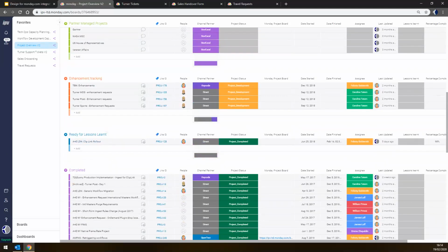And this is a way of keeping track of the status of the projects, and then allow us to plan for a final project review meeting before marking the entire project as completed. Another example of automations is using the date column to auto-populate when we receive a project completed status update from Jira. We can then use this data to analyze how long a project has taken.